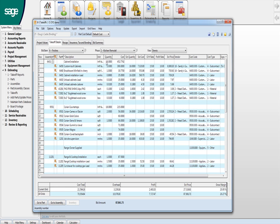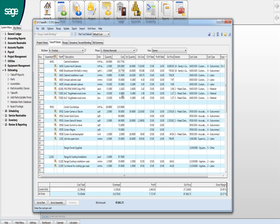So again, 18 feet of cabinet, it's $390 a foot is the way we estimate it. And then we upgraded to the cherry. So it was an extra $30, number of hours to install all these per foot. So it's 0.89 man hours per each foot. So it takes the 0.89 times 18 comes up with 16 hours times our $35 rate. That's my price.